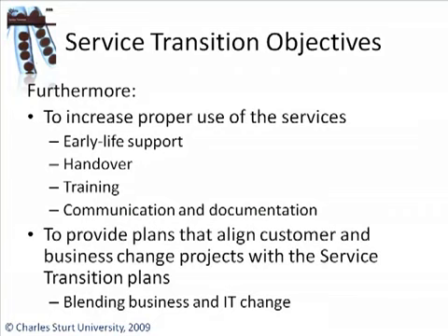You want to make sure you've checked all the boxes, you've got the documentation, you've done proper communication, you've delivered proper training, the handover has been authorized and signed off by the various stakeholders. So you want to make sure you've got your act together.